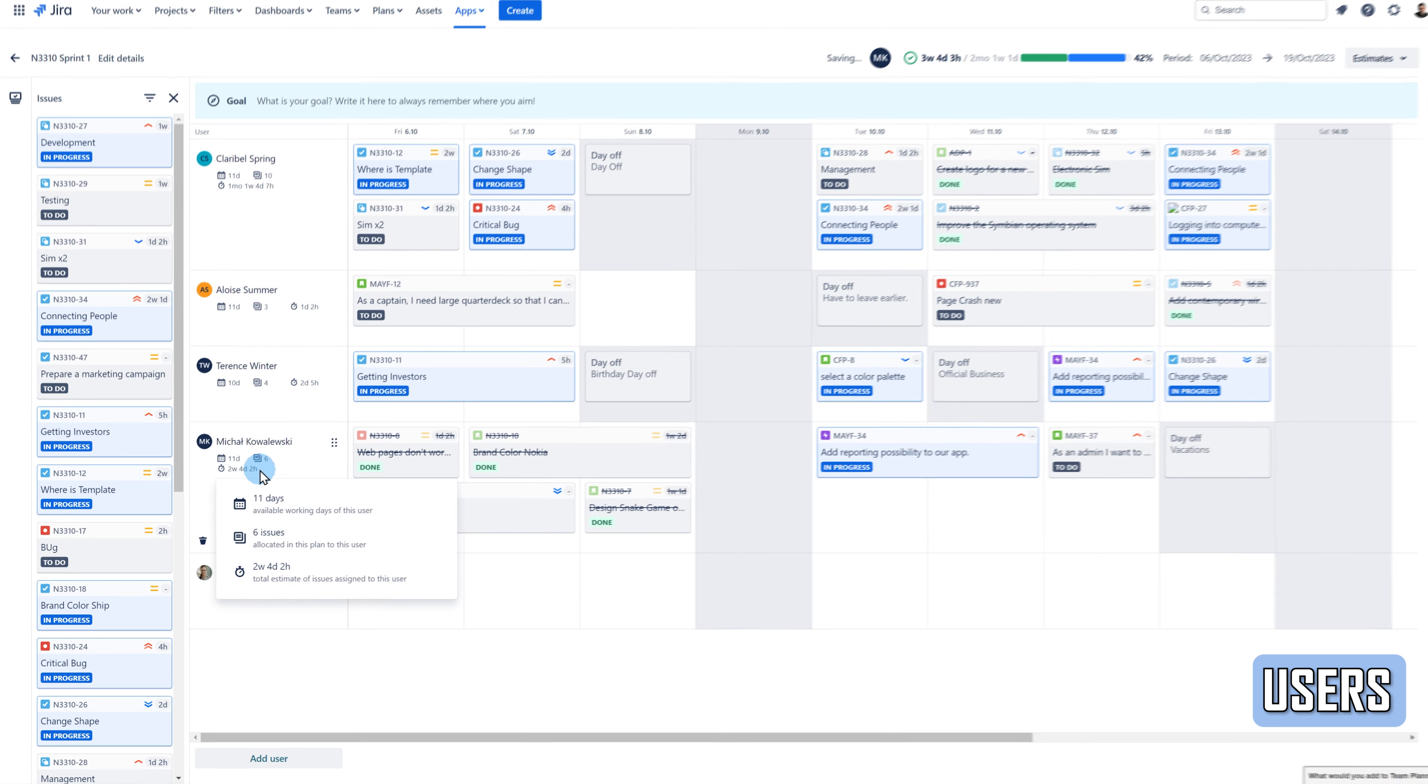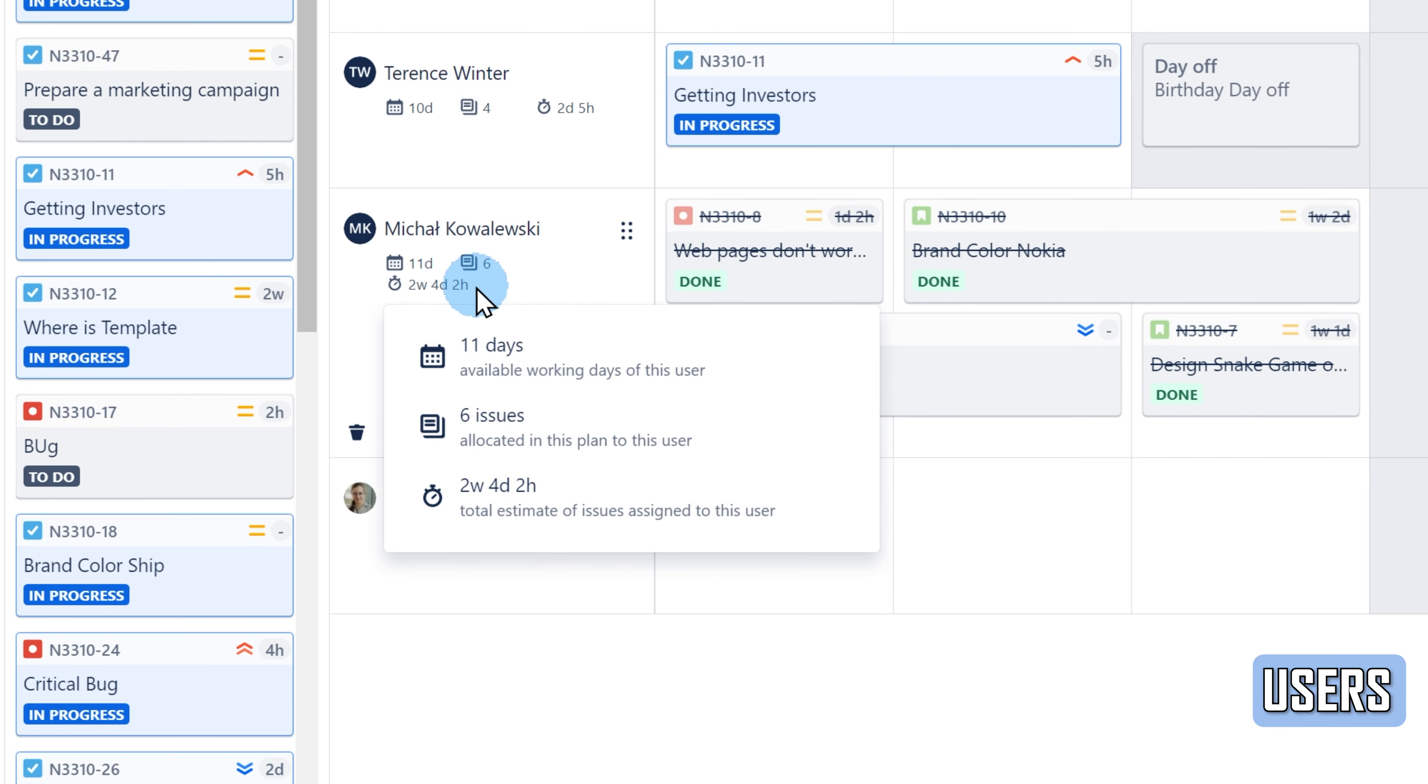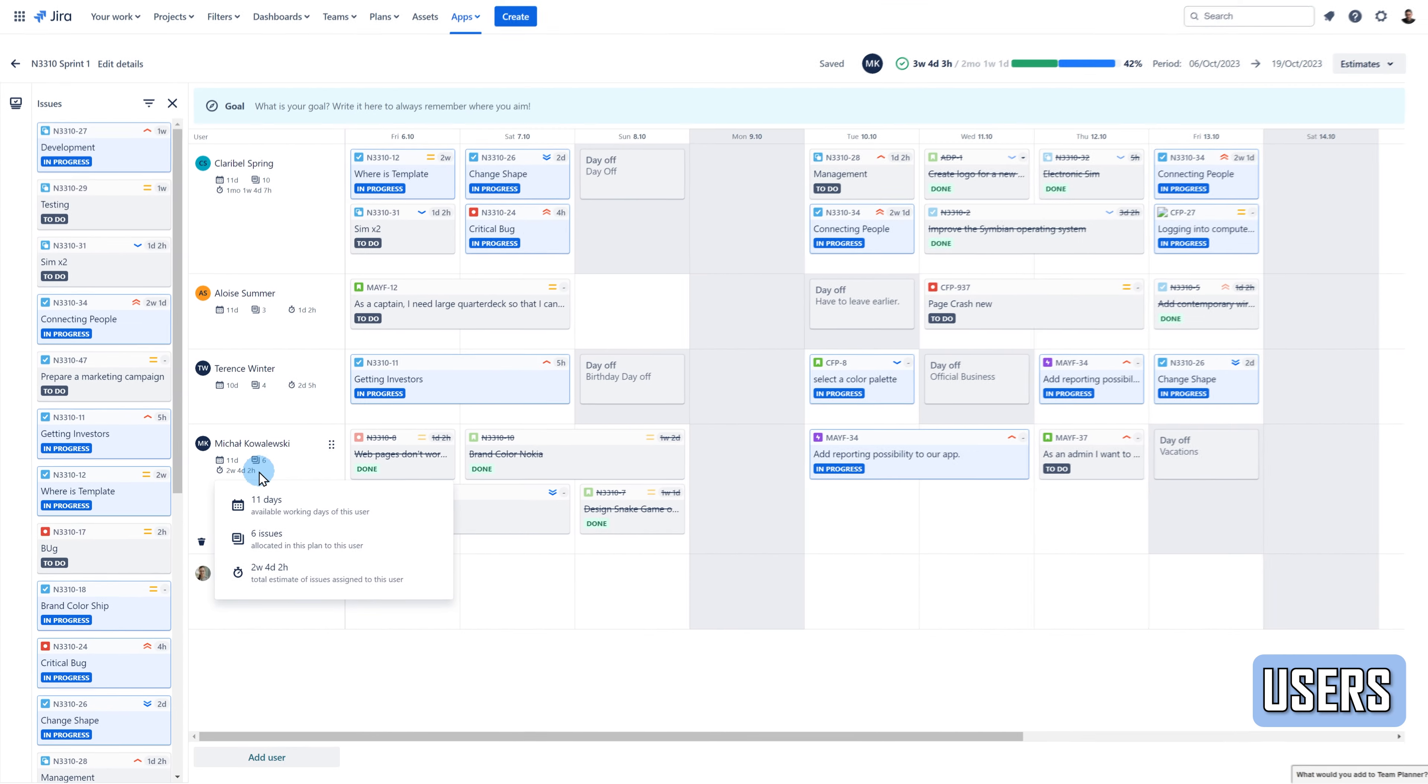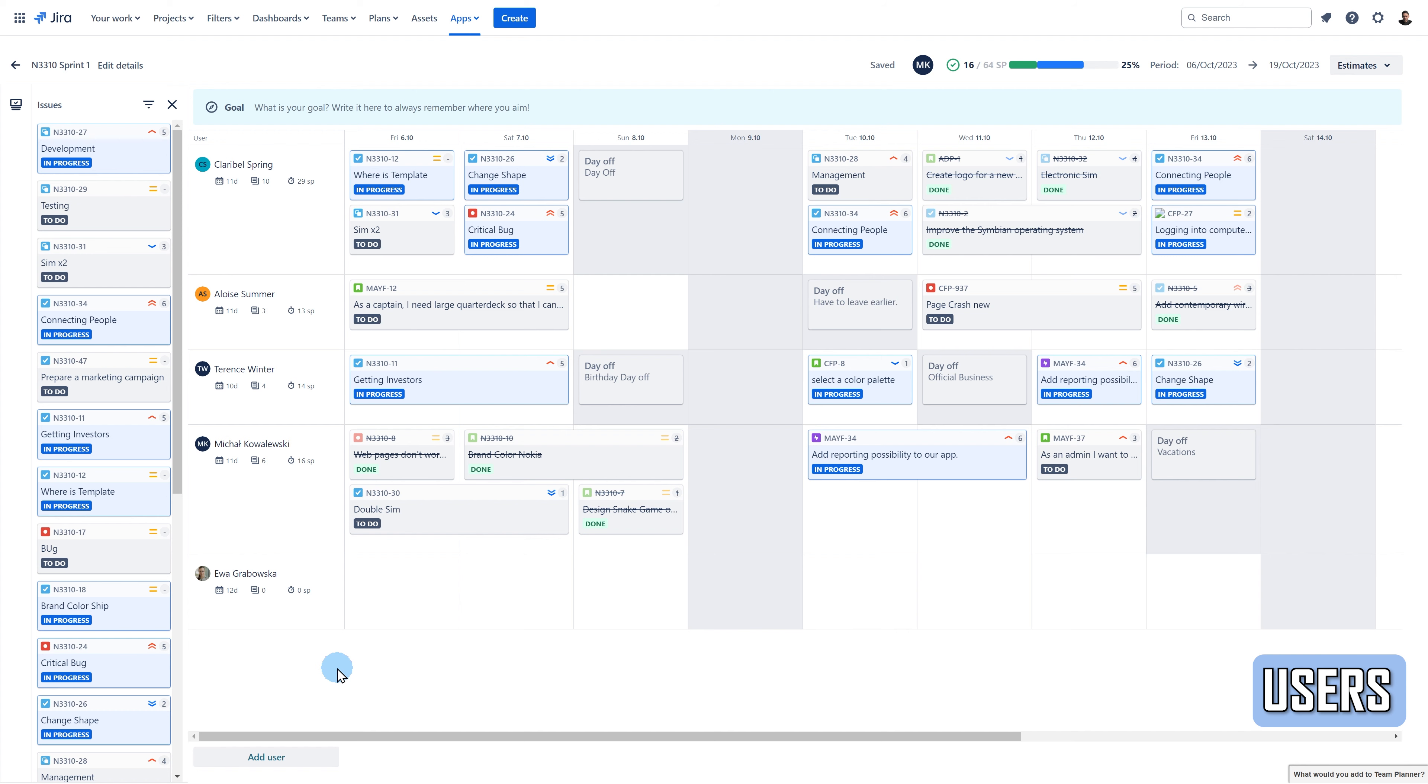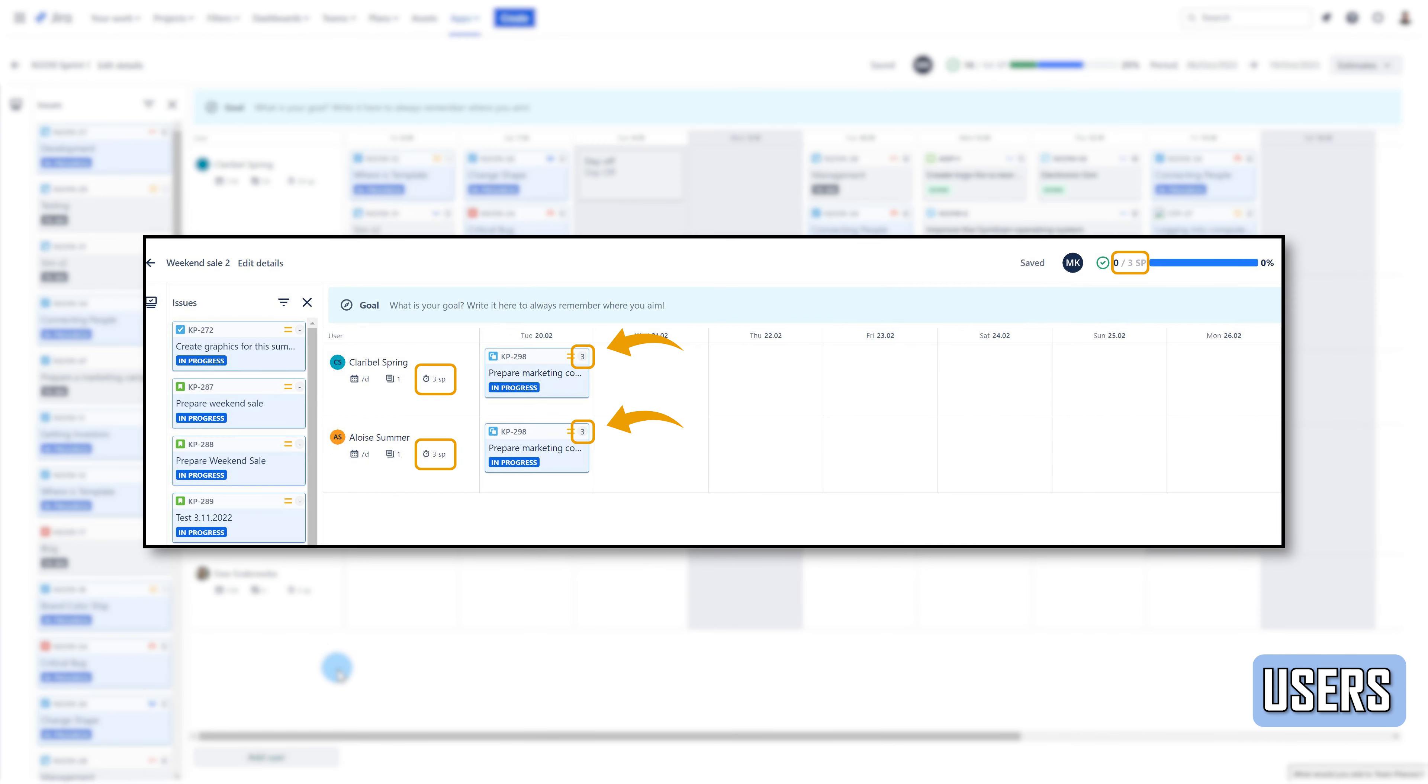Under the user name, you can see three key summaries: The number of working days available for the user, the number of issues allocated to the user within the plan, and total estimate of the tasks assigned on the plan to the user. The estimates will change to story points or original estimates depending on the selected options. The total will sum up all the values of the selected estimates from the issues allocated to the user on the plan. If the same issue is assigned to more than one user, for both users, it will be counted as the same value.